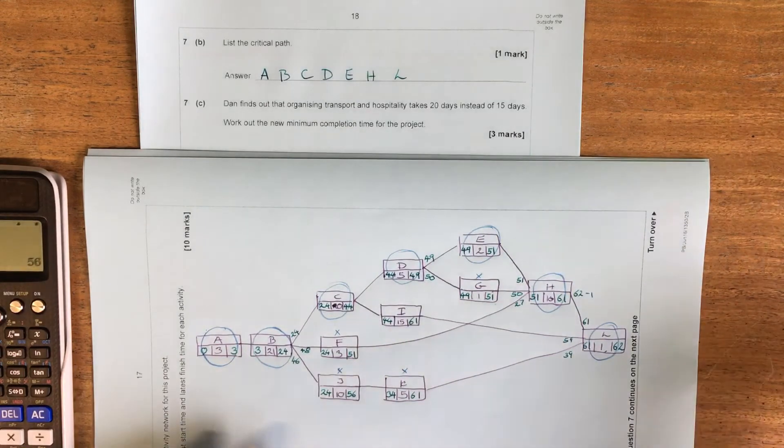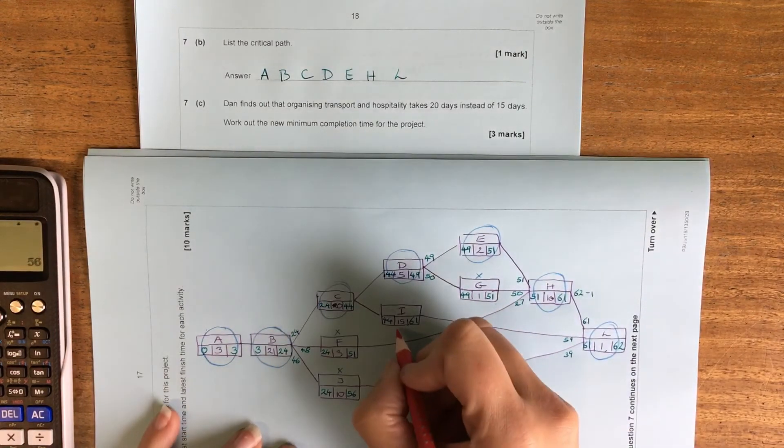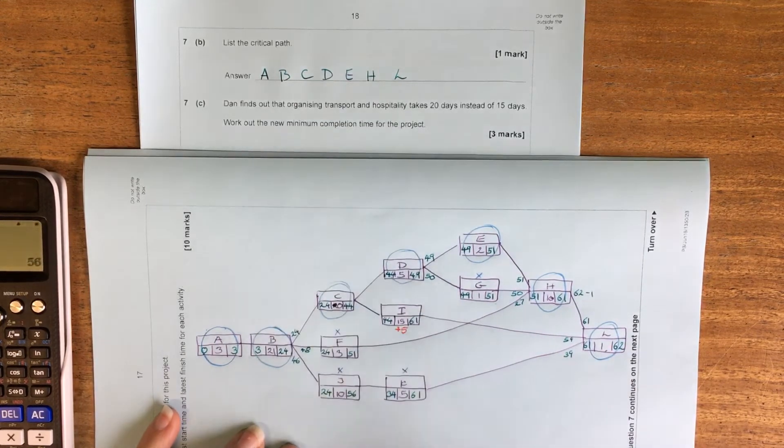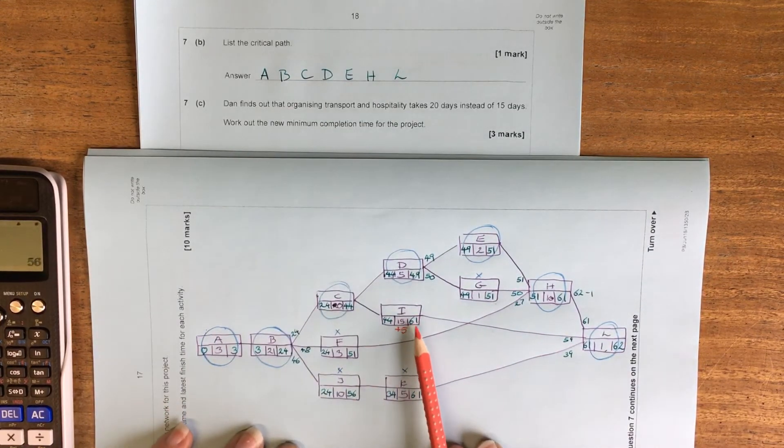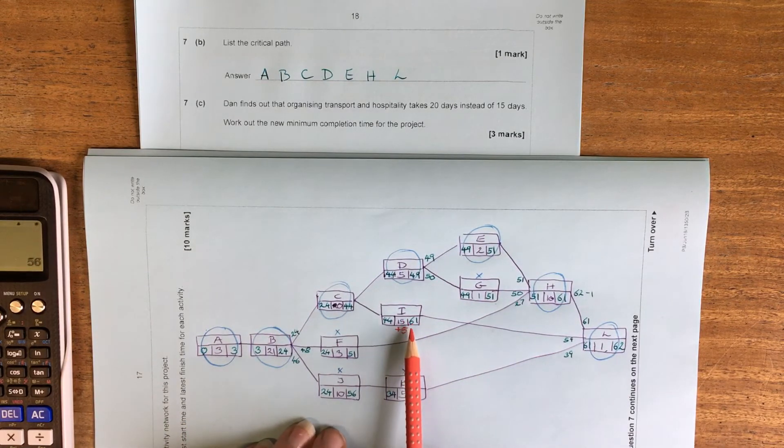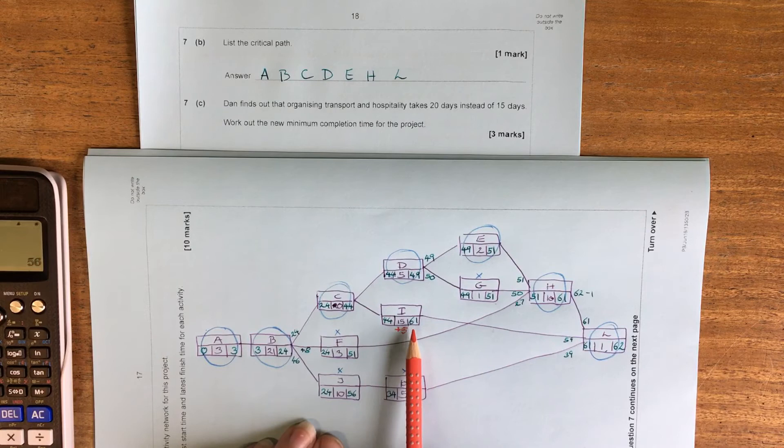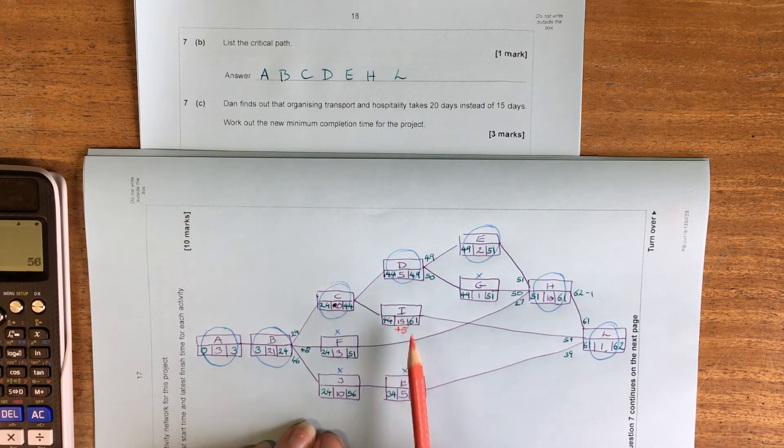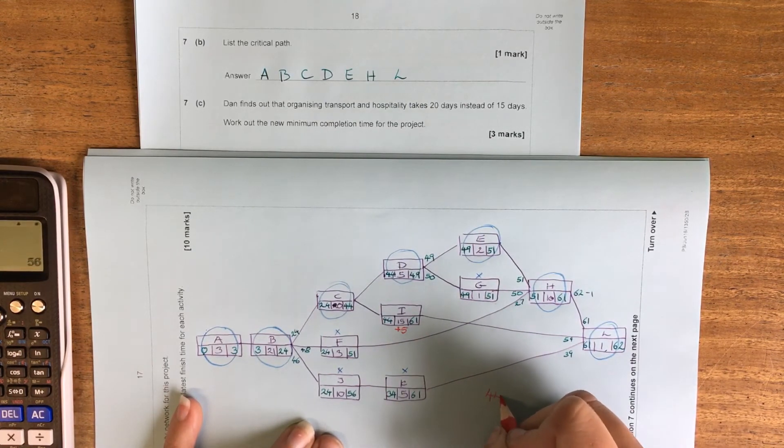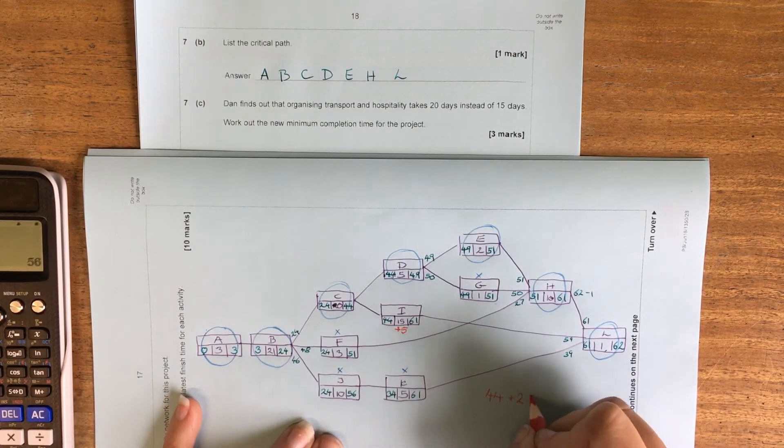So if we had another five days, is that going to push us past that 61? So 44 and 20, that means that we're not going to hit our 61 deadline because what we've got is 44 plus 20, which is 64.